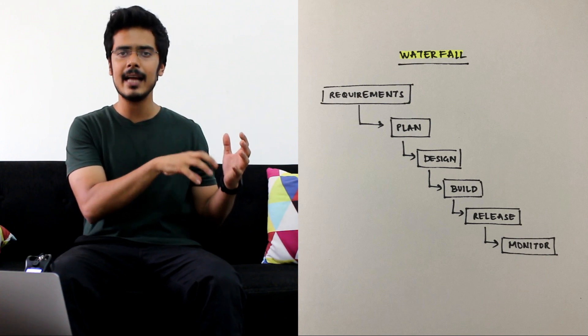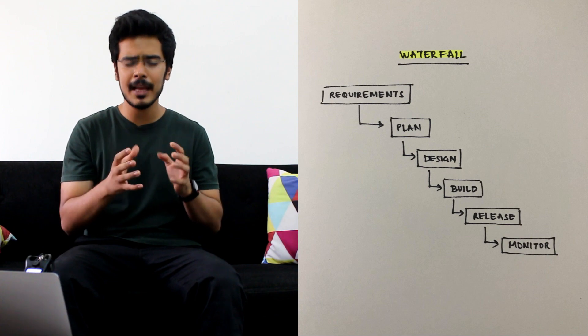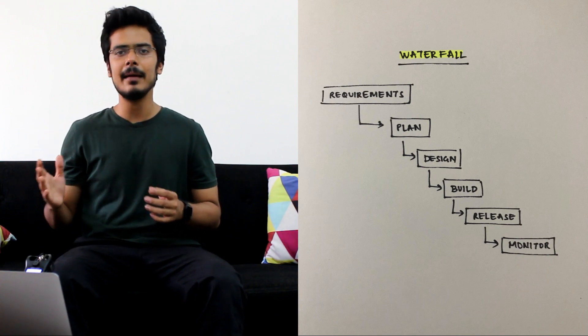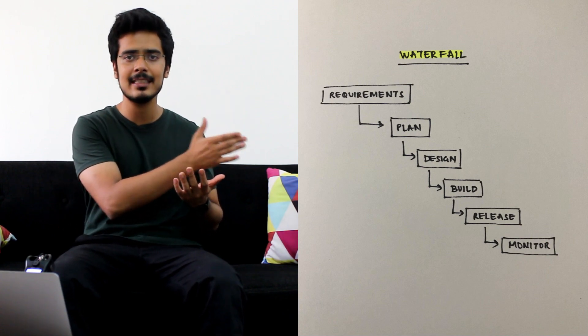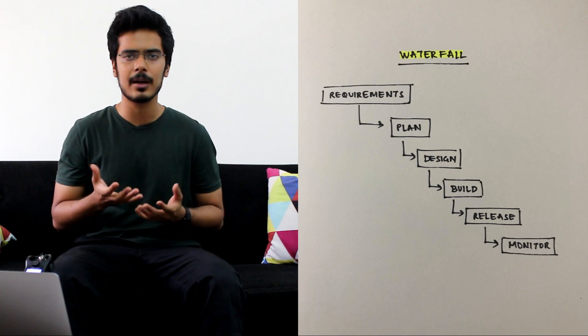So you finish all the requirement gathering for the product once and for all, then you move to planning. You do the planning once and for all, then you move to design. So basically at each of these steps there is no scope of going back and changing the requirements once that process is complete and each of these phases could typically take months to complete.